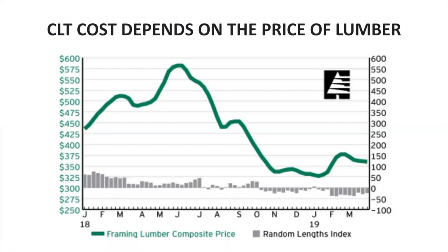The next image, you've seen another version of this, a little bit later one that I think Chris showed, starting from around here and moving forward. This is the commodity price for lumber. I really showed this slide to emphasize, primarily as a little bit of self-protection, that costs will change as a result of changes in commodity prices, which can be pretty dramatic.